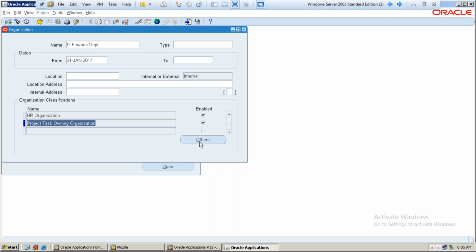Indirect projects means where we can handle only the costing information. It's like internal projects or R&D projects, which we call indirect projects. Here you maintain only the cost, and that cost is an expense for the organization. So we are not able to bill any customer, and we are not treating it as a capital expenditure.